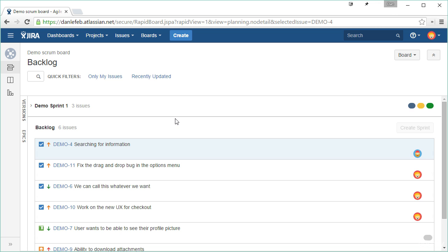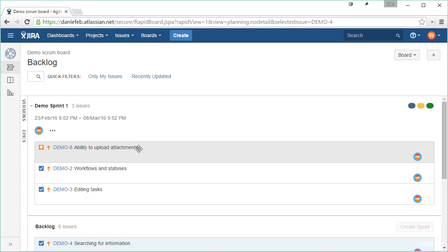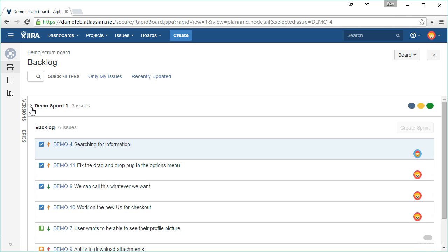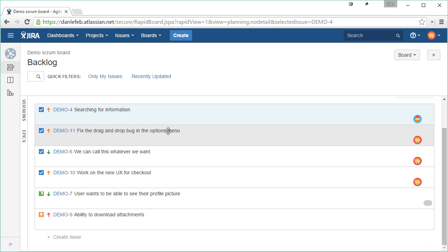In which case, you go to your team leader, manager, and figure out what needs to come off of the sprint so you can put something else on, since we all agreed in the sprint meeting to work on these items. Or you can say, well, is that something I can just add to my backlog? And if that's the case, you can add it in here.